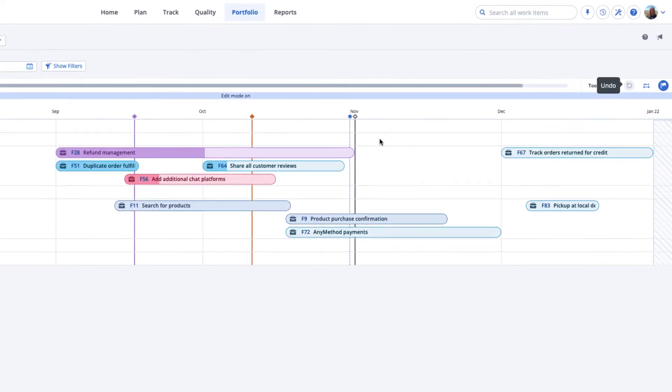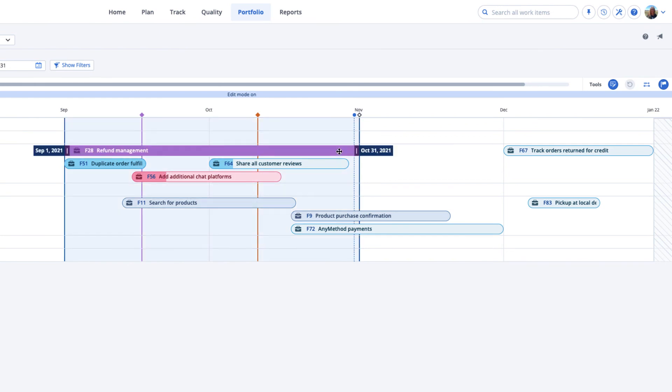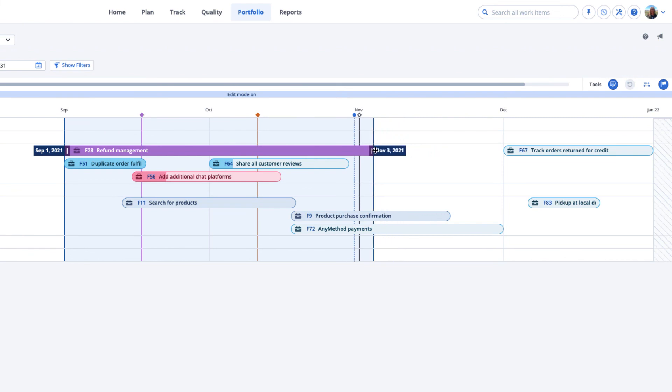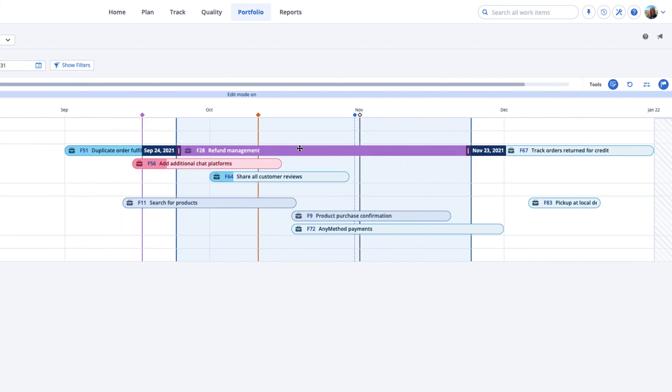Let's adjust date ranges on the Timeline page. You'll need Project Editor permission for those teams to change start and end dates or to change any other information associated with the Portfolio Items. When you select the Portfolio Item with Edit Mode turned on, the ends of the Portfolio Item become handles. Hover over the Portfolio Item to see the Move indicator. You may now move the Portfolio Item on the timeline from its middle, preserving a scheduled number of days.